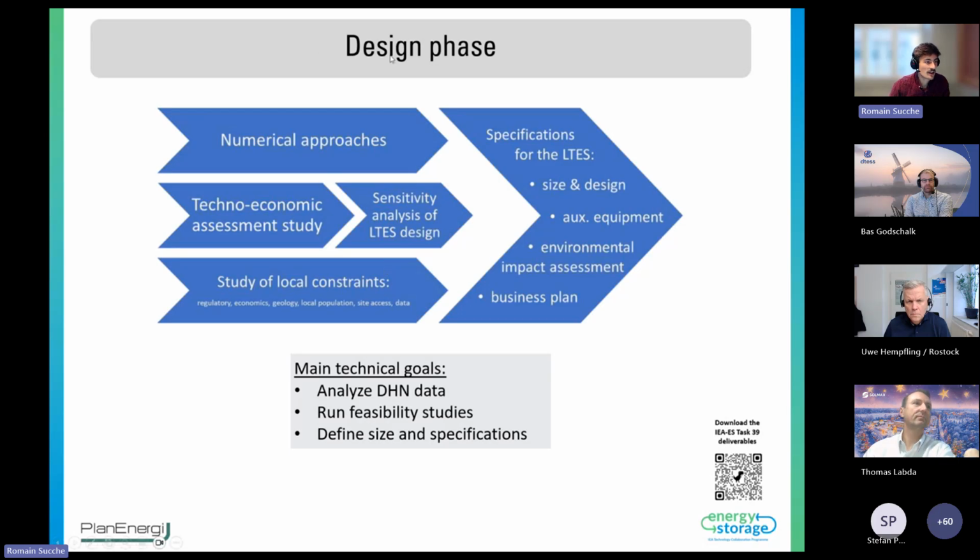Then the second phase is the design phase, where the idea is to go deeper into the numerical simulations, analyzing the district heating data, running more or less thorough feasibility studies, and running some sensitivity analysis on the key parameters that are a bit uncertain and can have an impact on the conclusions. And obviously starting to really define the sizes and the technical specification of the storage.